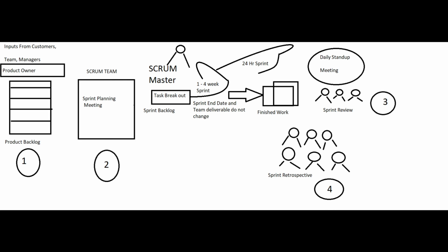For example, if a user story is completed by a tester with its test cases, during this time we are going to estimate some time. During this effort estimation we have to consider details like how much time it takes to design the test case, to execute the test case, to raise a defect, to generate a report, and after that, to review.